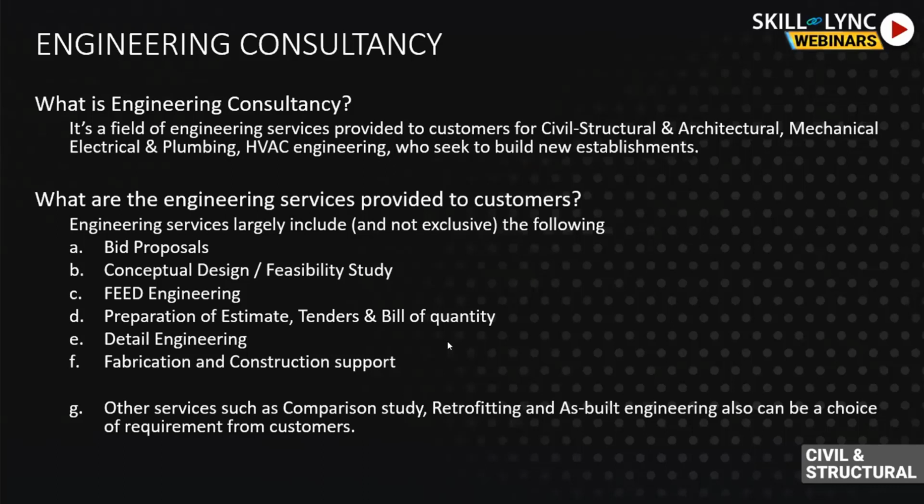If you could see, the term FEED here is written in capital letters. It means front-end engineering design. So why is it called front-end engineering design? Because this is a type of design which is not entirely detailed, but is done in a fair amount of detail to come up with a certain cost estimate. So it could be stated that a design which is approximately 70% of its final design output can be called a front-end engineering design.